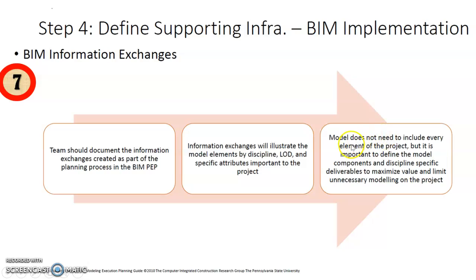Now the models, the different BIM uses at different stages of the project, need not include every element of the project. But it's important to define the model components and discipline-specific deliverables to maximize the value and limit unnecessary modeling on the project. Okay, so that is under this BIM information exchange.